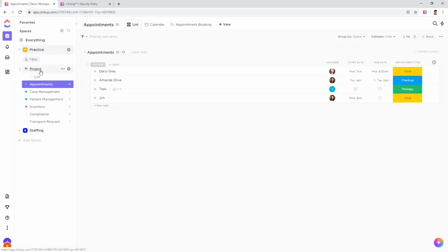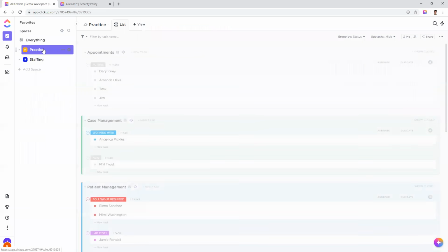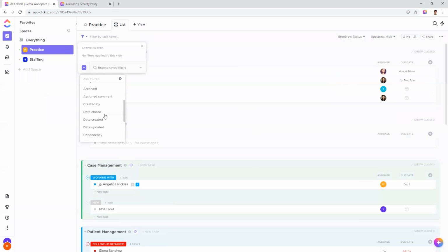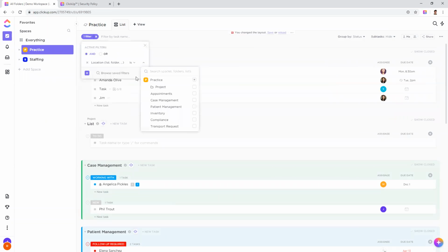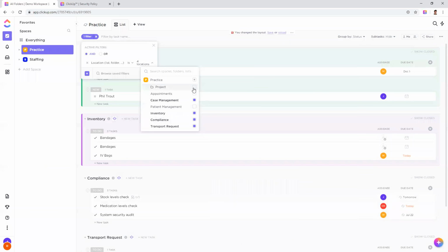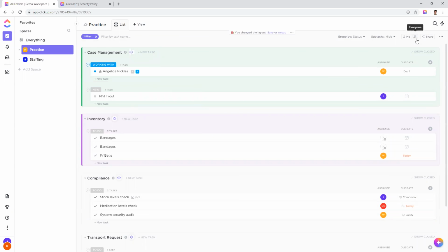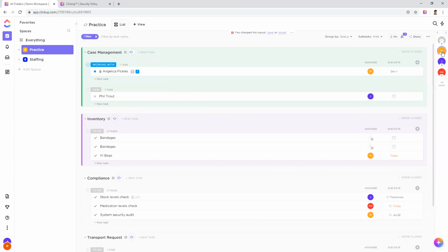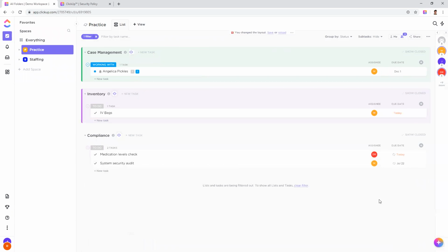Then you could go to the top level, whatever it might be, I might go to the space, then filter for location, and just choose the locations that are not your projects. Then you have all the other project managers' locations, and you would look at the people sidebar for your people and see, okay, these are the tasks they have that have been assigned outside of my projects.